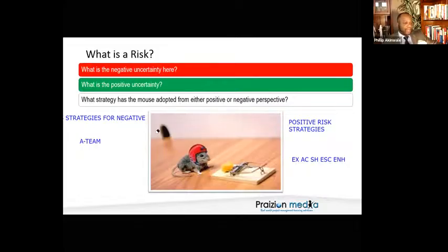Do not forget that escalate is on both sides of the world, okay? What we're doing now is really going to help you on your exam, because a lot of the questions are built around these scenarios with the 5 strategies on either side. So if Phil tells his business unit leader, hey, I found this, I cannot deal with it, it's not transfer because we're talking about a positive risk here. So he's escalating it to his business unit leader to deal with it. Just keep that in mind. Read it carefully, and just remember, if it's positive, then it does not contain the words used for negative.